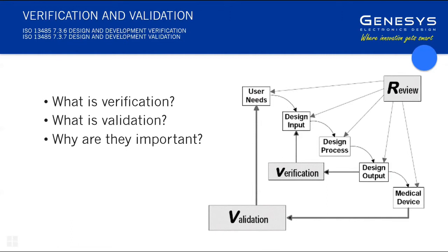pre-reviews done. The regulators will do this, but if you look at organisations, for example, we use TUV to do 60601-1 conformance. They will do a pre-review process, give you guidance before they do the formal review. So by a small amount of extra money, you can actually head off a large amount of extra money if you have a problem. So really having that continuous engagement with all of those stakeholders, starting as early as possible and keeping that going, firstly, it builds trust. Secondly, you will then have inputs that help you avoid problems that crop up right at the end.